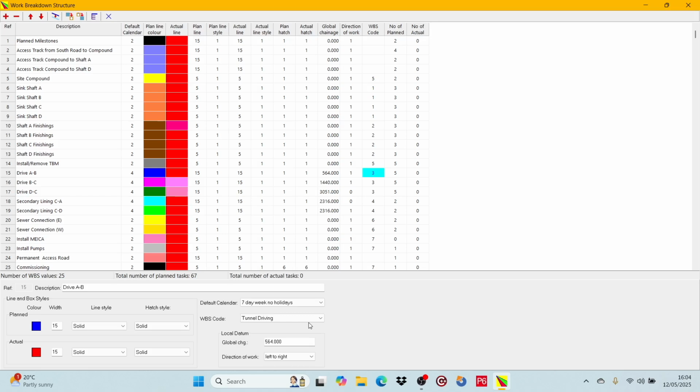Having a hierarchical WBS, one with multiple levels, could complicate the user interface and is not actually needed for a TimeChainage chart. However, having two levels of WBS can have some benefits, and designing the software this way means you can ignore the WBS code completely if you don't feel the need to use it. I will explain what the benefits are with a couple of examples, but let's take a look at the WBS